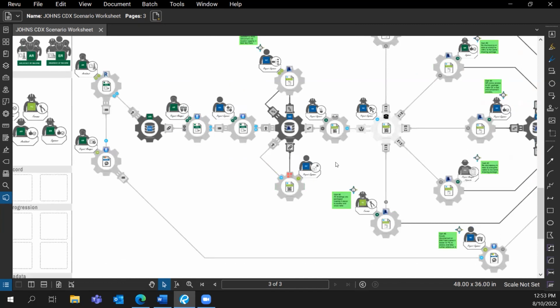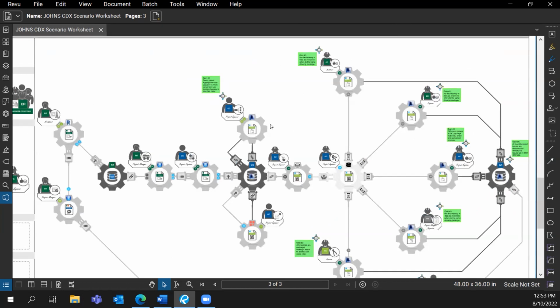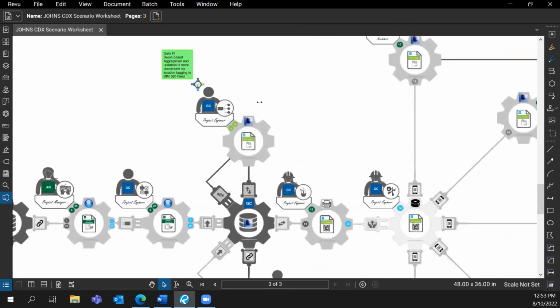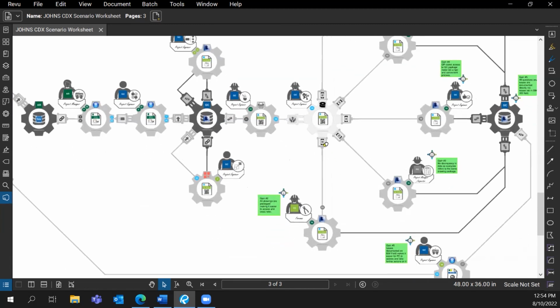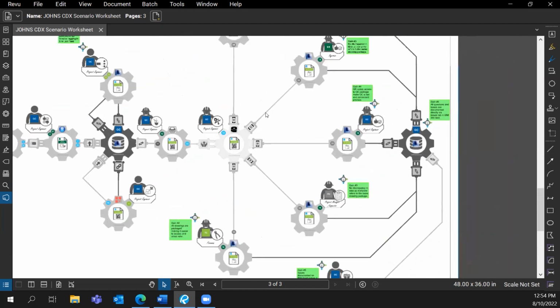Now, one interesting thing is I tried both these methods, and then I did a lot of experiments about that. So in this aggregation process, originally it would take around 40 minutes to make a package for one room, whereas now the new thing would reduce that time to 10 minutes, which basically reduces the time by 75% for one room, which is substantial.